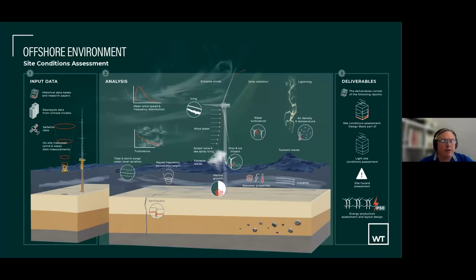And then very importantly, the mid-ocean conditions and the wind conditions will give you your loading, what the turbine structure has to resist. And then that load is transferred down into the soil through the steel. And you have to understand exactly what the soil looks like as well. So there's a tremendous amount of data gathering that has to go on as part of the development of these projects. And that fits into the very long timeline that Kim was talking about.